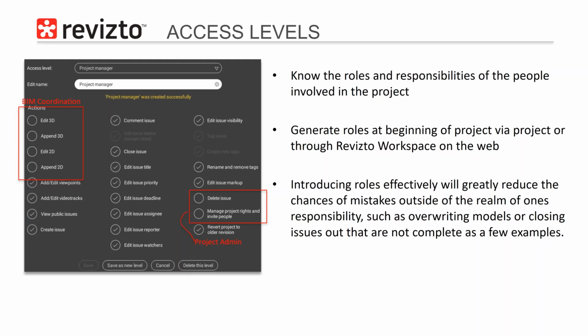close them. We want issues that happen throughout the projects to be indefinitely recorded, so that if something was closed a year and a half ago and you're working on a 4-year-long project, well, if an issue arises from something that was closed 2 years ago, if it's gone from the project, you don't have access to it. Whereas if it's still in the project, you can go back, you can revive that information from the dead and interject it directly back into your project if it was an issue that happened early in the design phase but is rearing its head in construction. We can go back, we can revive that issue, we can ask the important questions, and we can collaborate in that real-time environment how to solve that issue.